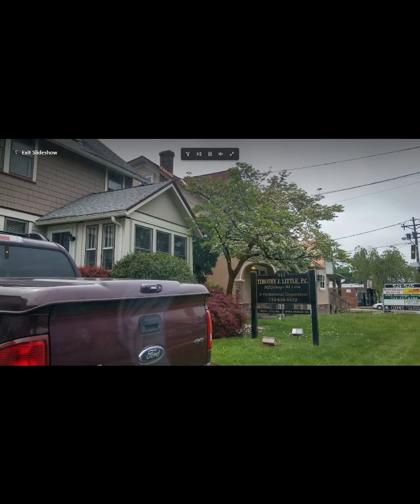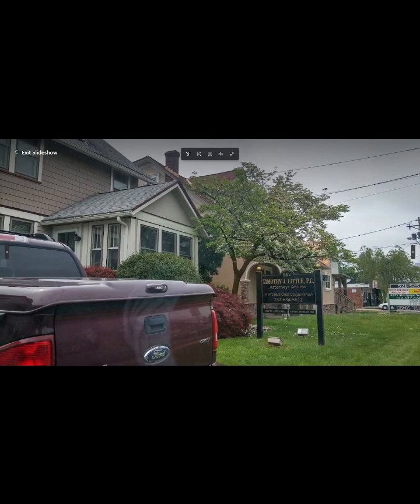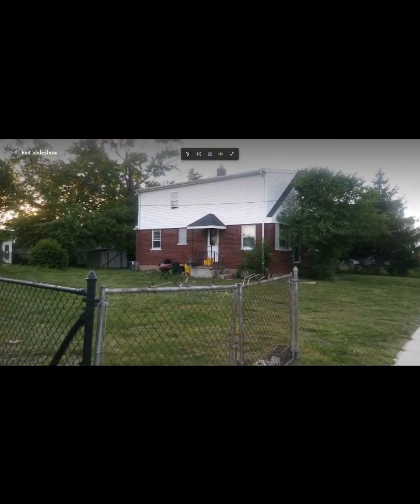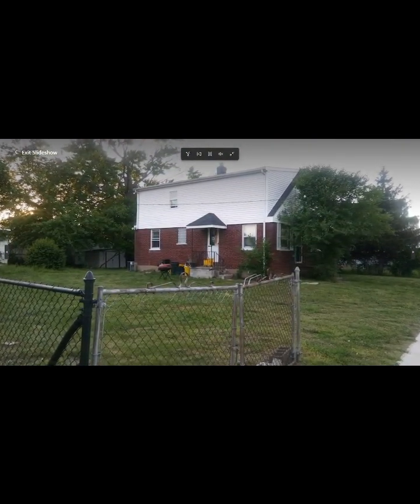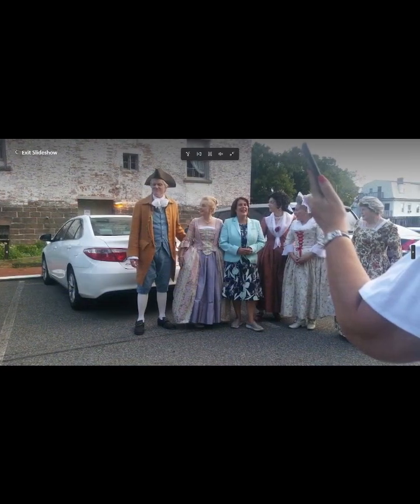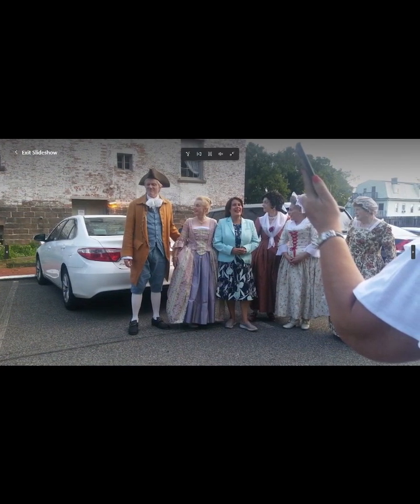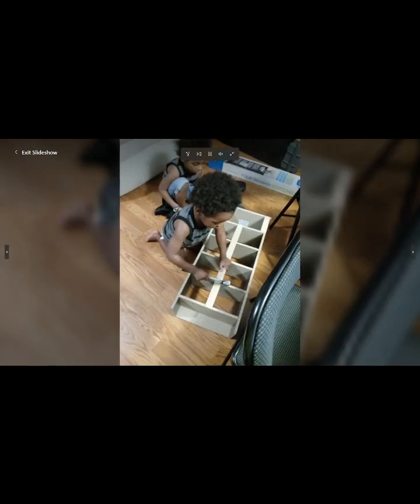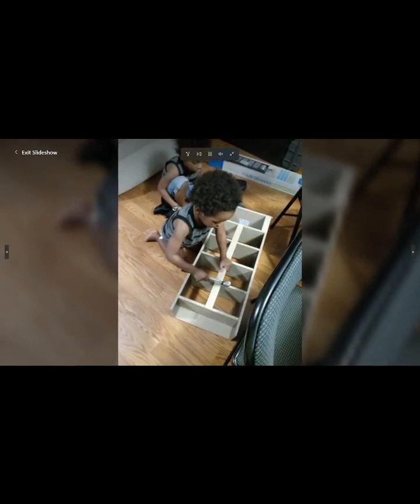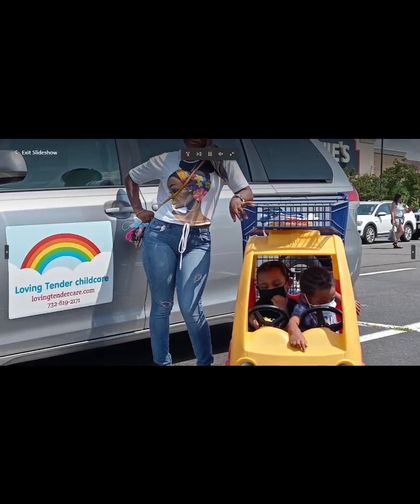Operation of law. This type of situation can be related to some legal issue that arises and creates or cancels the contract. For example, a contract that is made on the basis of fraud is canceled when the fraud is discovered. Partial performance. Discharging a contract for partial performance refers to acceptance by one of the parties of incomplete work by the other party, with an agreement that the incomplete work will constitute fulfillment of the terms of the contract.